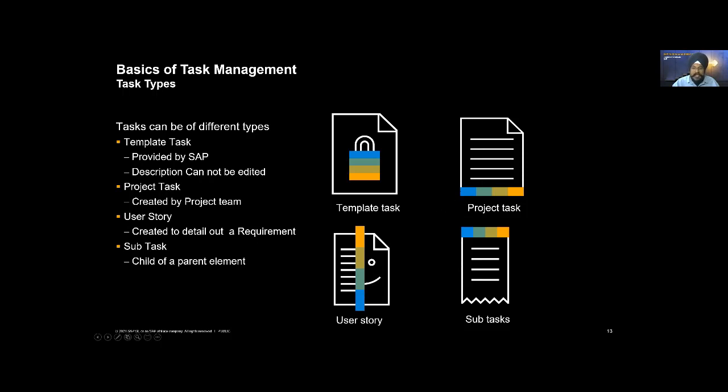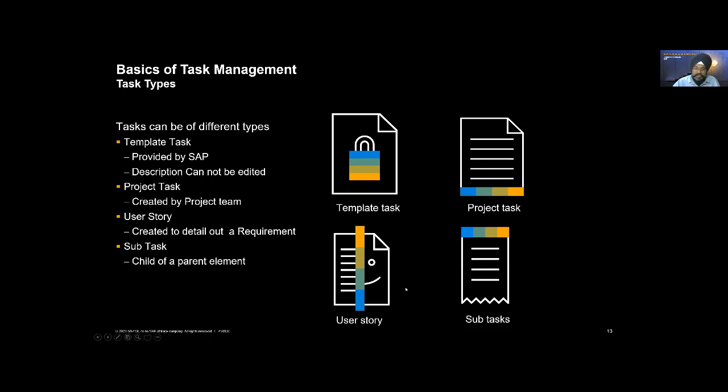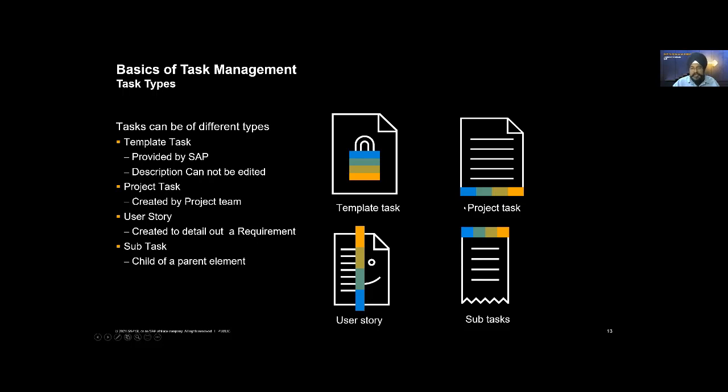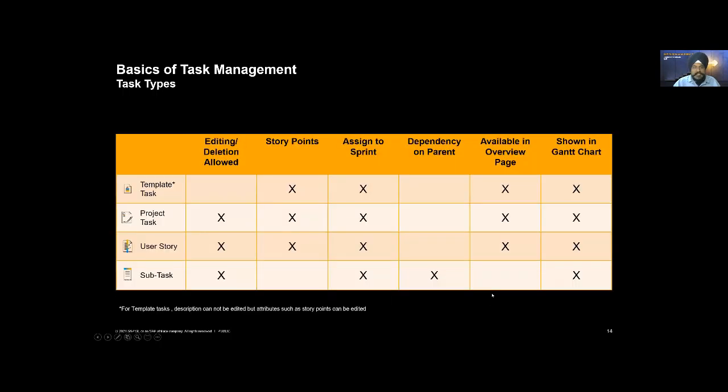Then we have project tasks. These are typically used for operational purposes or clarifications, alignments, meeting booking - whatever you want to track. Anything that takes effort, you should ensure there's a discipline in the team to create project tasks. What are user stories? User story is more closely related to requirements as we will see shortly. We expect you to create user stories below a certain requirement so that you define the requirement further. There's also something called story points. Project tasks and user stories are very similar in nature. Both can have requirement as a parent. Both have story points. Both can be assigned to a sprint.